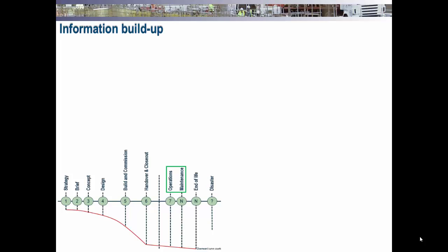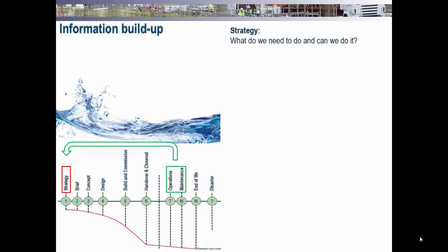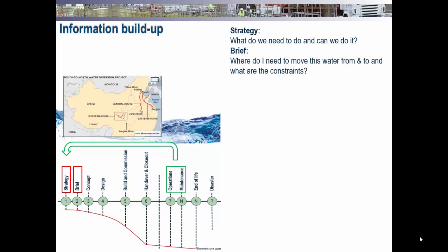The observations we gather at this moment in time tell us whether the asset is still operating and performing as it was designed, and whether there are any maintenance issues that cannot be overcome through day-to-day repair. These observations, combined with the financial and political information, are used as the basis for a strategy, whether we should replace, dispose, upgrade or augment the existing infrastructure. This strategy is then combined with information on existing assets, such as documents, data, metadata, CAD, etc., and the contractual package that forms the basis of the project information model.